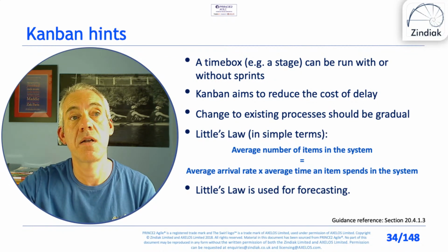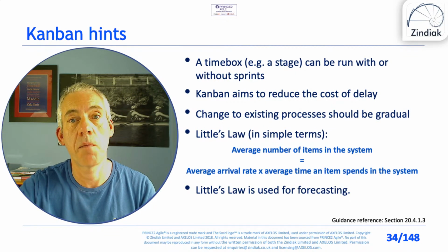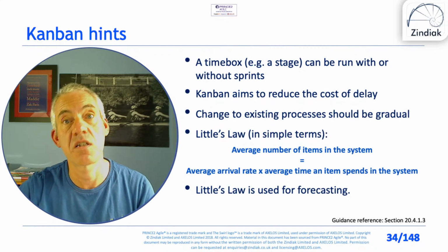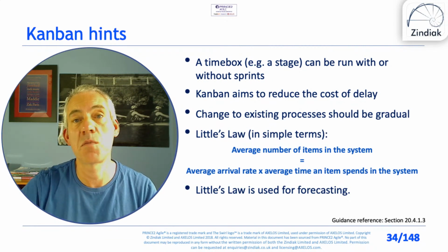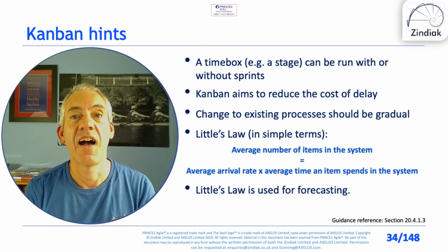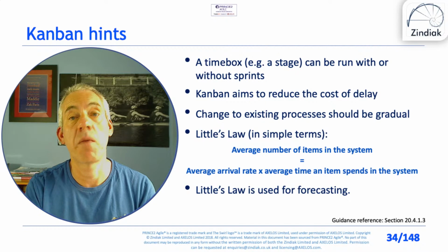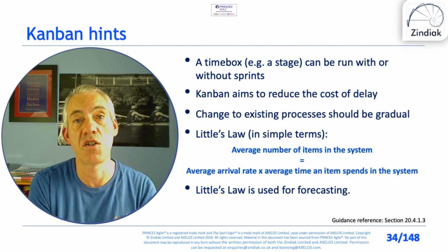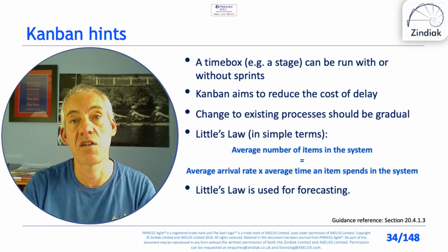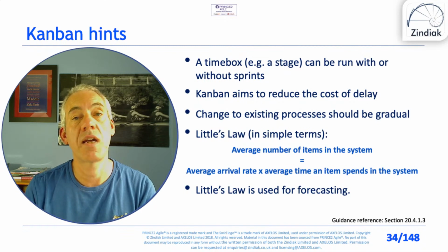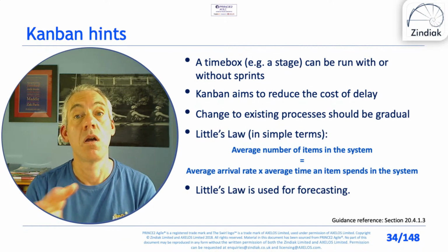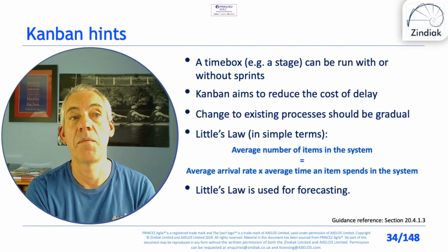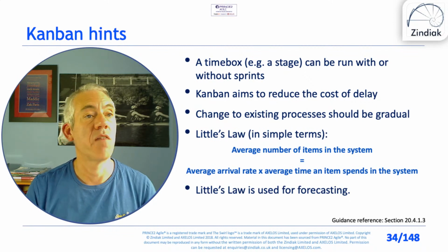We can also break the stage down into low level time boxes called releases, and then break the releases down into low level time boxes and call them sprints. So we can break things down as much as we want and give them whatever names we want. And really, that's down to you as project manager. And providing, on a PRINCE2 principle, you have at least two management stages, an initiation stage and a delivery stage, how much you break it down and on how many levels is entirely down to you. You just need to specify it at initiating a project stage, in the initiation stage, so everyone knows what you're doing.